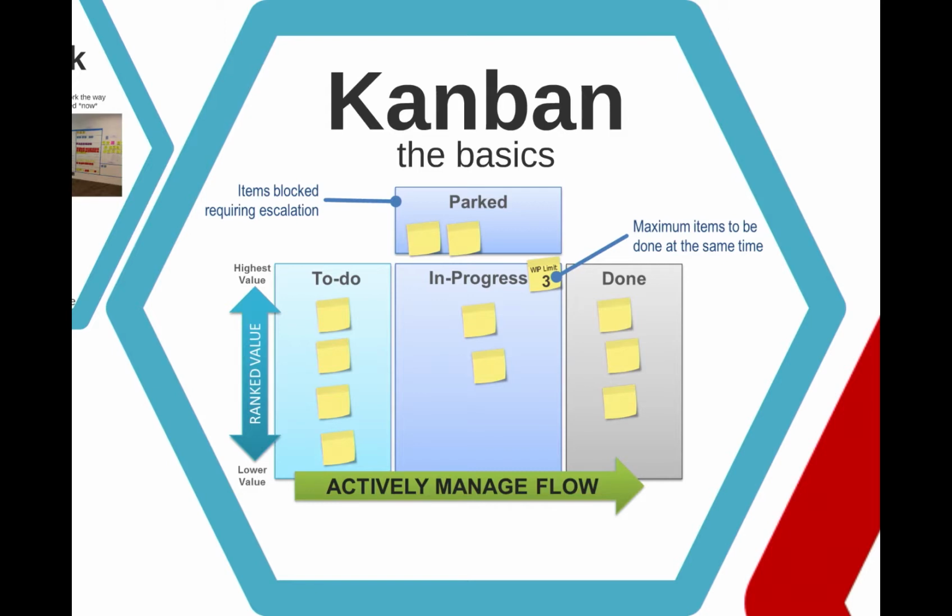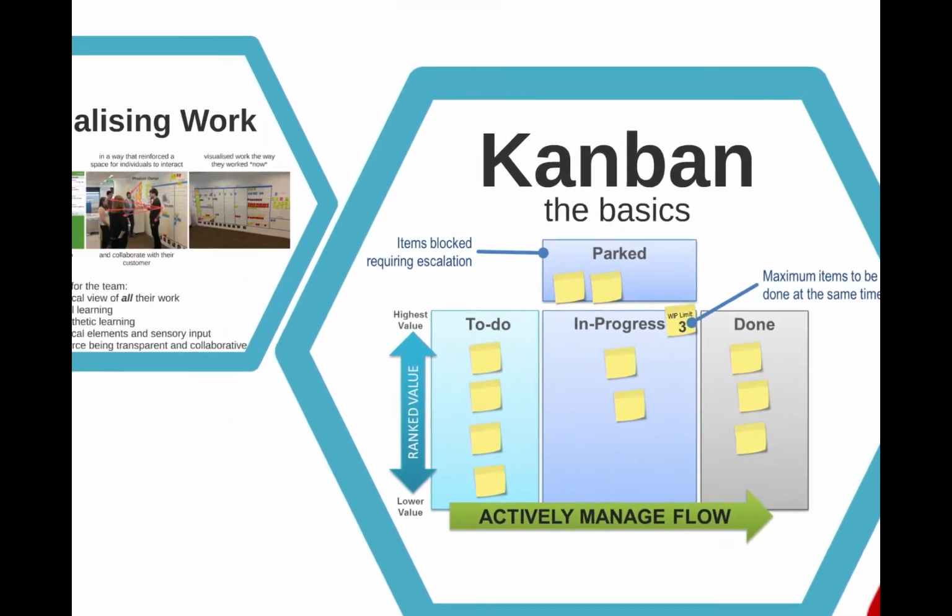Looks pretty simple. Now, this is a pull system rather than a pull-push system. So I would take something off here and I would pull it into in progress. And once it's done, I'd pull it into done. Now I've got capacity, because I don't want to do a bazillion things at once. Better that I just do a few. So now that I've got capacity of something isn't done, I can now pull something from to-do into in progress. That's the idea. Rather than saying, well, I'm finished with my analysis, so I'll take all my analysis and here you go, now build it. Here's the whole big chunk. No, this is basically based on a pull system. And this is how Toyota produces cars. And that's why they continue to be the #1 manufacturer of cars in the world. So not just software, manufacturing.